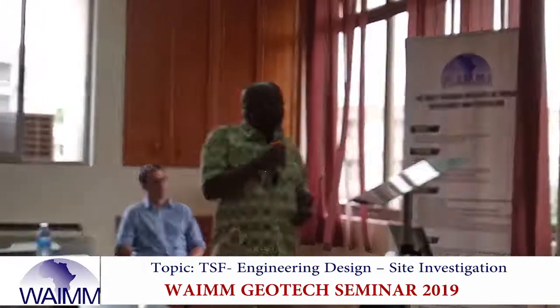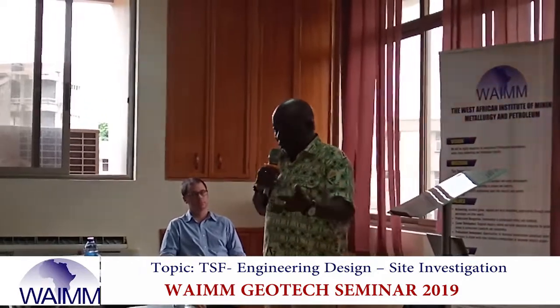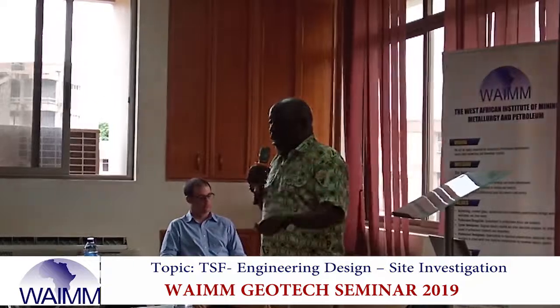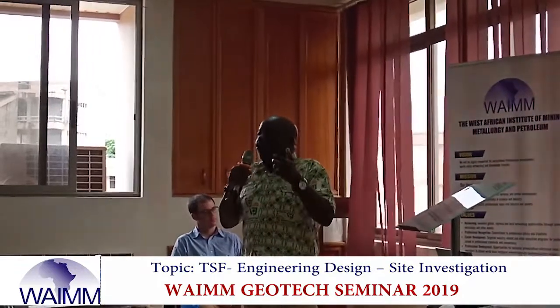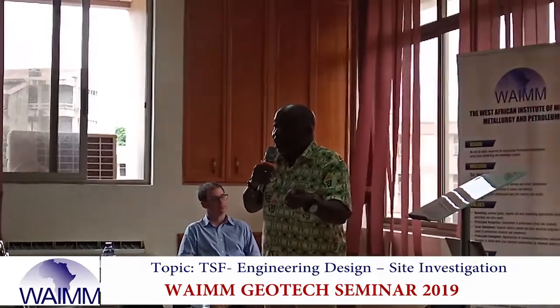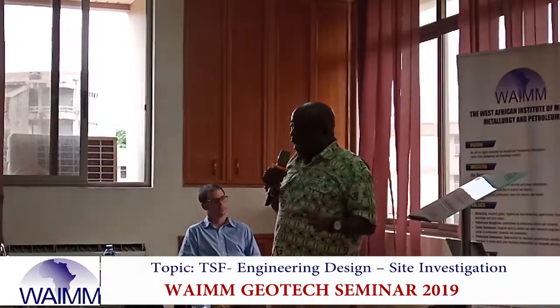Then when you have done that, normally we will provide an inception report. The inception report shows your appreciation of the project. How much is involved? What work you have to do. In fact, it's normally at this stage that the geotechnical engineer will be able to now provide a cost of how much the whole exercise will take.